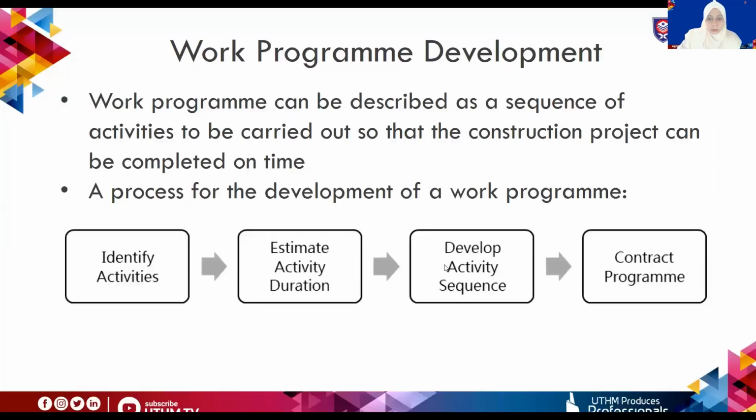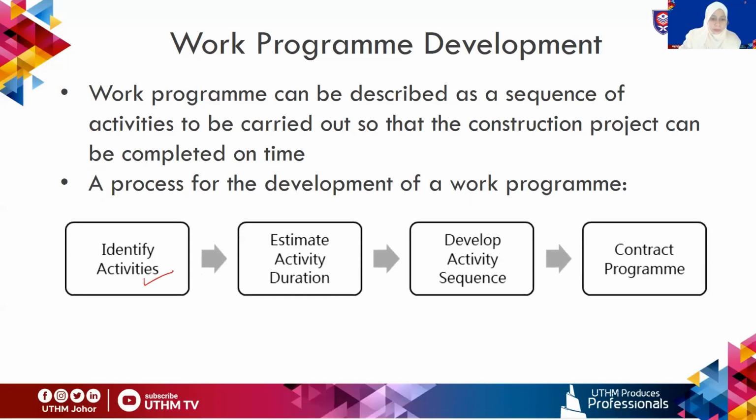Okay, so the sequence of developing a work program. We start with identifying activities, preparation, sequence, and then lastly we will make the work program. Okay, that is the process. So all of this process we will learn step by step, right?